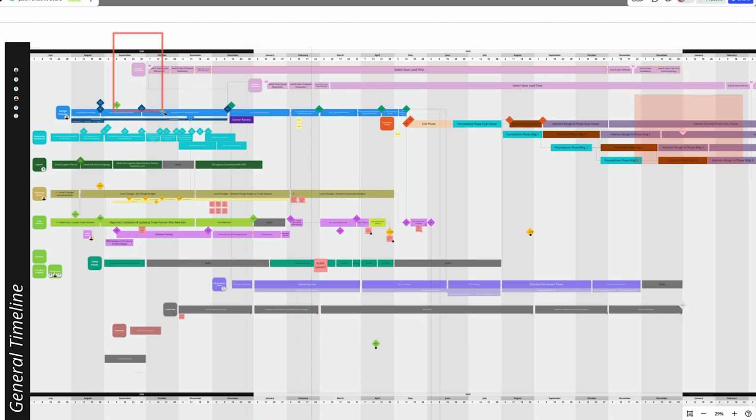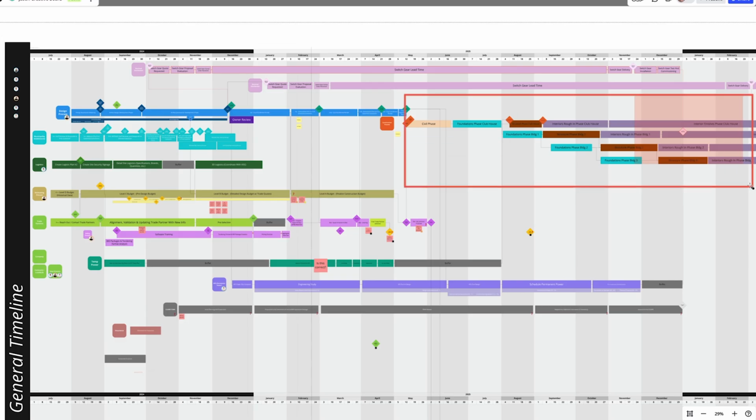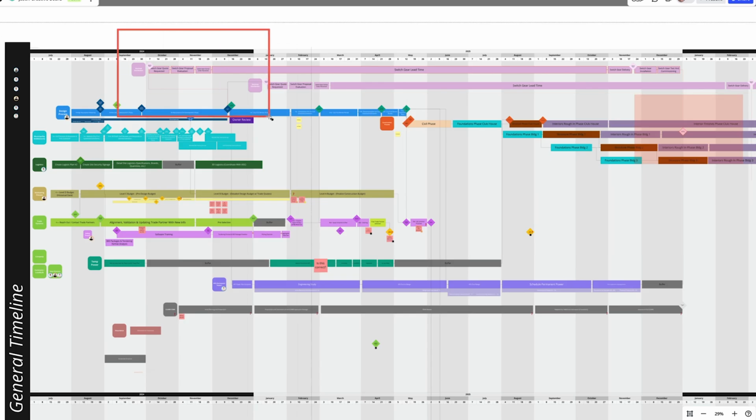Okay. And here's something that Fred Strasser taught me at Oakland Construction. He said, don't fall asleep on these timelines. So we showed this in a visual format so that we knew every critical thing that would have to happen in order for us to execute this production plan and have permanent power. So we drove in a positive way the design team to get us the information. And guess what? We were actually able to release the switchgear on time because we didn't fall asleep on the timeline.